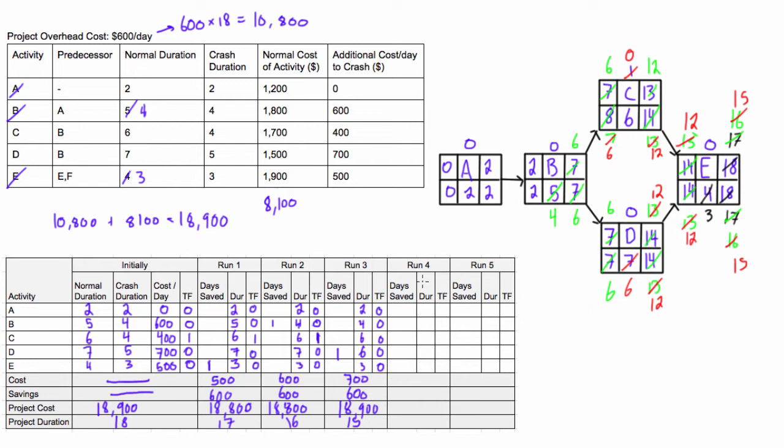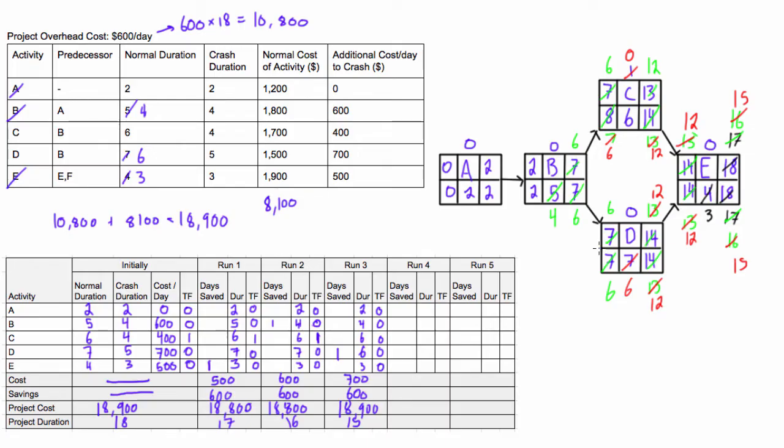Okay. Let's look at this. Run number 4. We have still... We're still able to... Here we can even put that as a 6. So we're still able to crash activity D and activity C. But you'll notice if we only crash one of them at this point, activity C or D, because they're both critical and they're both in parallel to each other, by crashing only one, we wouldn't actually reduce the whole project duration by a day. So we need to crash both of these at the same time, because they're both in parallel on the critical path. So we need to knock a day off of both of them. So it's going to be one from C and one from D.